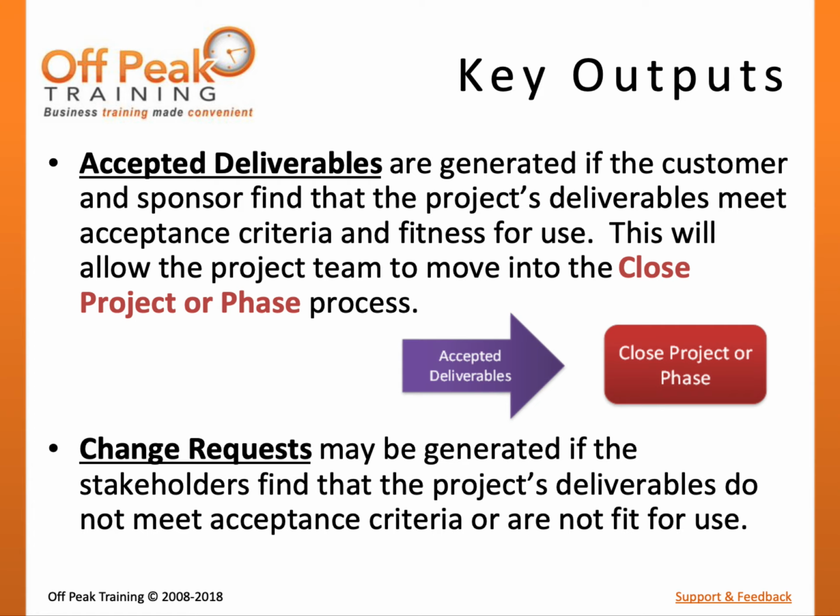As described in Chapter 4, change requests are an input to the Perform Integrated Change Control process. The Change Control Board will need to evaluate if the change is within the current scope of the project and the impact the change will have on various project objectives such as schedule or budget. Change requests that are approved will lead to rework that will be performed in the direct and manage project work process.